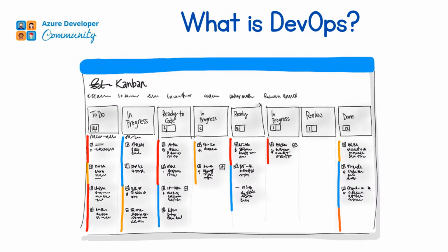What does the scrum master do? The scrum master plans the tasks, what the next task will be, what we have to do next, and if there are deployment bugs, all those things are managed by the scrum master. And all the developers come to that meeting, and they mainly answer three questions: what you did yesterday, what you will do today, and what challenges you are facing. So they basically answer these three kinds of questions.